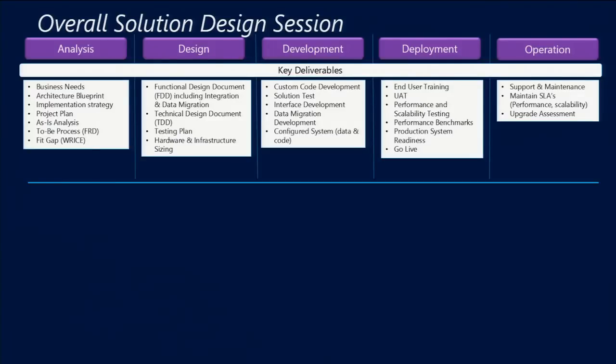What you need to make sure up front is that the customer knows how important it is actually to create the documentation. Now, whether you use an agile methodology or whether you use a waterfall methodology, neither one of them says don't do documentation. The only difference is on when the documentation is complete and the process for sign-off. In Agile, it's at the end of the process. In a waterfall, it's at the beginning of the process. But you absolutely need to have that for the customizations, for the gaps. The functional requirements doc caters pretty much for standard, with the functional design docs on your customization. So that's very much an acceptable approach.